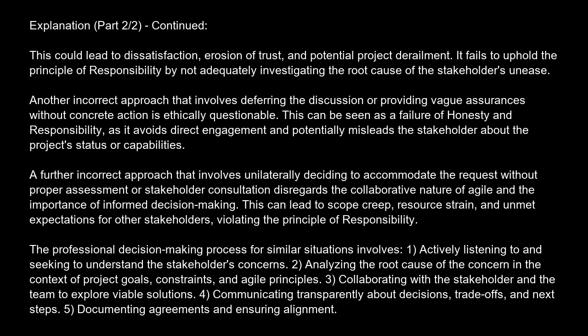The professional decision-making process for similar situations involves: 1. Actively listening to and seeking to understand the stakeholders' concerns. 2. Analyzing the root cause of the concern in the context of project goals, constraints, and Agile principles. 3. Collaborating with the stakeholder and the team to explore viable solutions. 4. Communicating transparently about decisions, trade-offs, and next steps. 5. Documenting agreements and ensuring alignment.